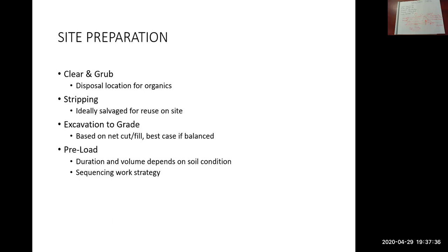Again, it's directed by the engineer. So it'll be shown on the drawings to preload if preload is required. There would be a separate bid item for it too, typically. So it's not hidden. If it's there, you'll see it. It'll be obvious.